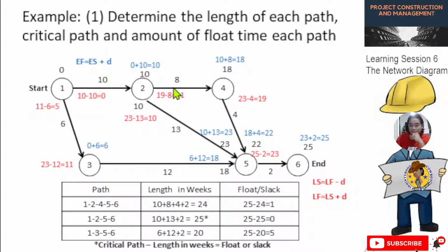for this one. But as you can see, we have two paths. So I will stop from here so that we can choose, and I will explain why the second path will be chosen. For this one, the last finish is 23 for this activity. So 23 minus 13, this is the duration, so the answer will be 10.